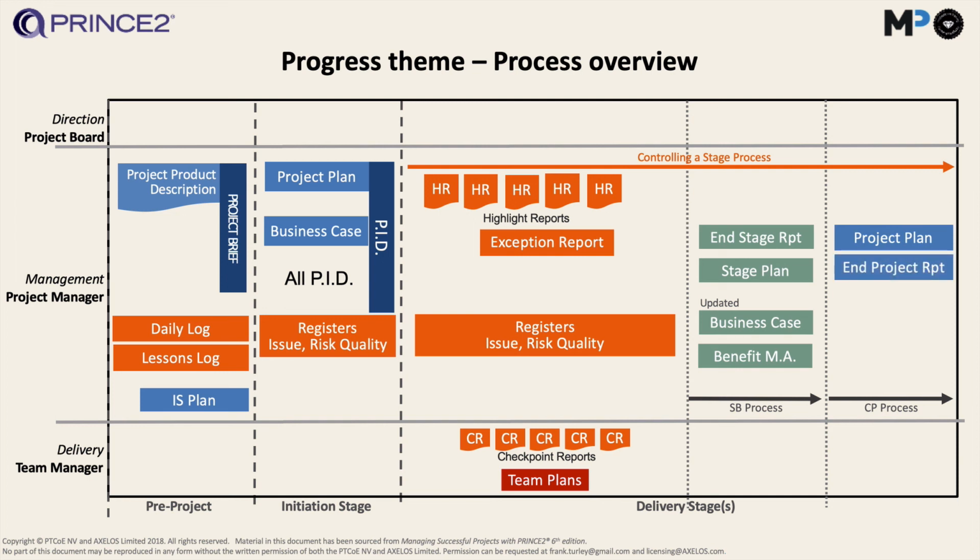Then we will create an end project report, which is a good document that describes the whole history of the project and how it went as well. And just remember again that actually every management document in PRINCE2 can help to control the project and give progress information about how the project is doing, but I've just worked on these ones here.